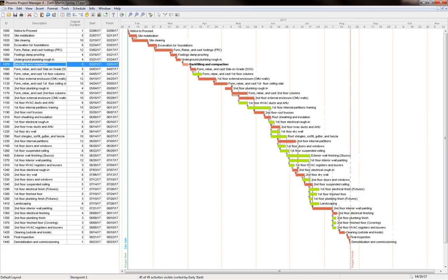I want to tell the software, look at all the activities. If the activity is critical, select it. If it is not critical, set it aside. What is the main criterion for a critical activity? A critical activity has a total float equal to 0.